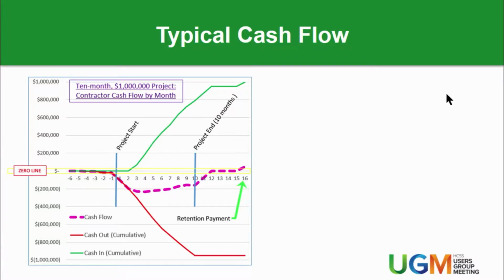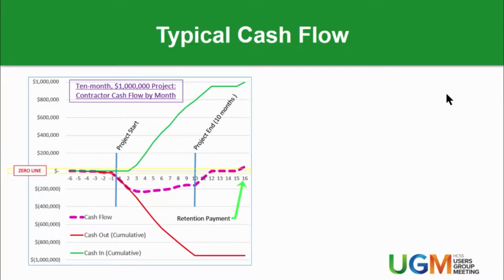If you're not managing cash, or you don't take advantage of what you can with quantity discrepancies, and with the fact that some items, this bridge should go before that one, or demo this before you demo that. If you don't keep in mind, as you're setting all the bid prices, getting cash moved up in the job, you're going to suffer from this and have a negative cash flow for months -1 all the way through 15 on your 16-month job.